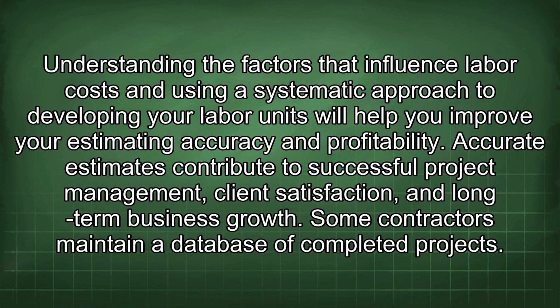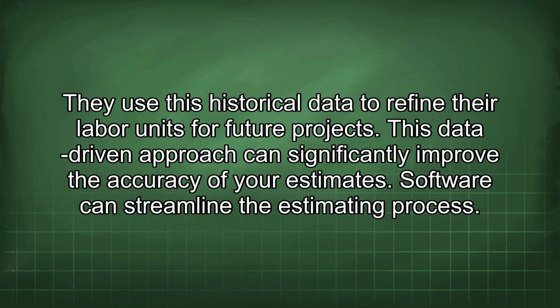Some contractors maintain a database of completed projects. They use this historical data to refine their labor units for future projects. This data-driven approach can significantly improve the accuracy of your estimates.